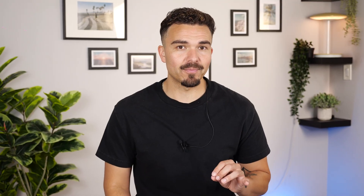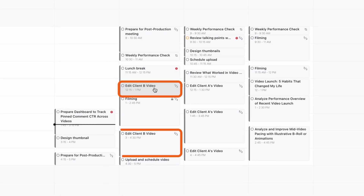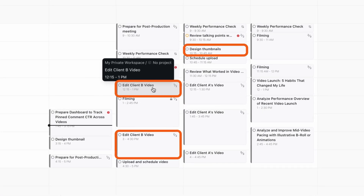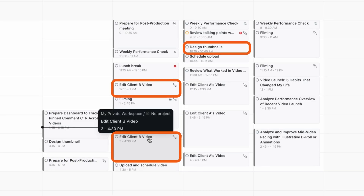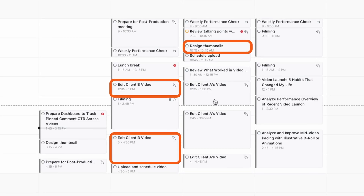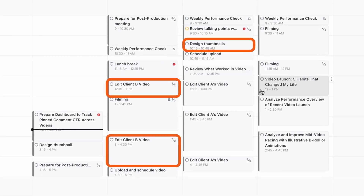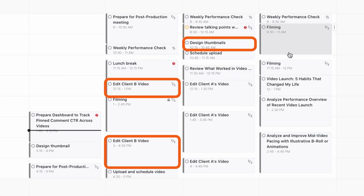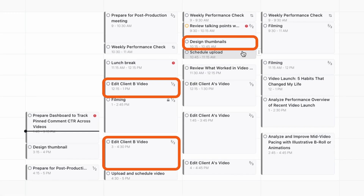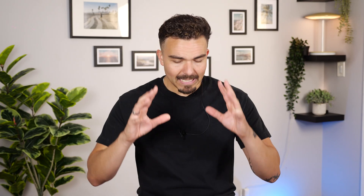Now here's where Motion's AI really excels. Once my project tasks are in, they're automatically scheduled into my calendar. You'll see Edit Video, Design Thumbnail, and other tasks appear at the best available times, based on their priority, deadlines, and estimated durations.